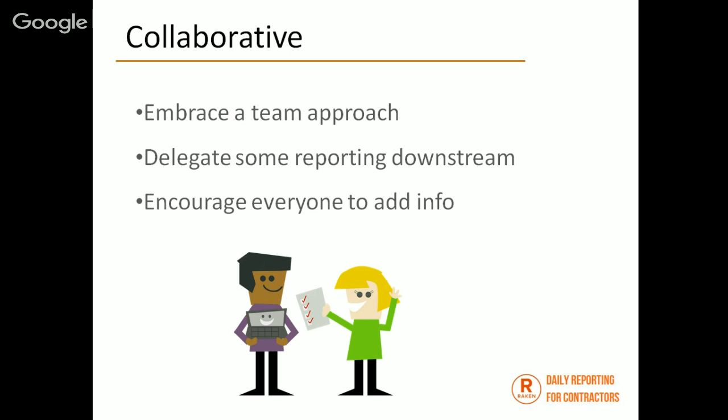We had our operators start doing equipment utilization reports. One company I worked with, we set up a whole program where their linemen in the buckets were actually doing their material usage reports. So at the end of the day, they were submitting the report of all the nuts and bolts and hardware that they used to put up the power lines. So it was a good system. And the foreman and the superintendent didn't have to go around and ask 20 different people, how many nuts and bolts did you use today? So we've got to look at ways that you can push that information downstream.